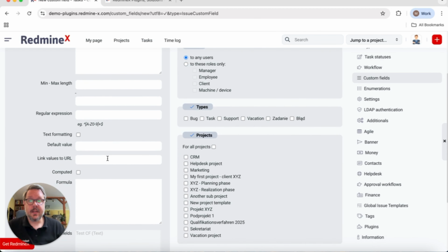Then there is a section where you can define whether the field is required, used as a filter, or searchable. Required means if you create a new issue, this is going to be a required field, meaning you won't be able to save the issue without filling in the issue internal ID, which might come in handy, but may create some problems with, for example, the Gantt chart, where you can create issues, but there are no custom fields. So you will get an error, but you won't be able to input the correct value of the required field.